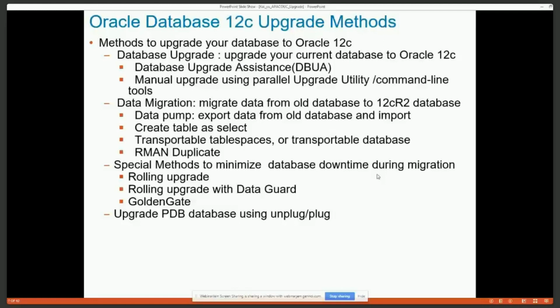So if you have a huge database, how long an upgrade takes really does not depend on the size of the database. It depends on how complex your database is. For example, how many tables you have, how many database procedures you have, how many different languages you have. If your database has multiple languages set, it could run a little bit more time because dealing with the different language sets is part of upgrading. That is something you want to consider.